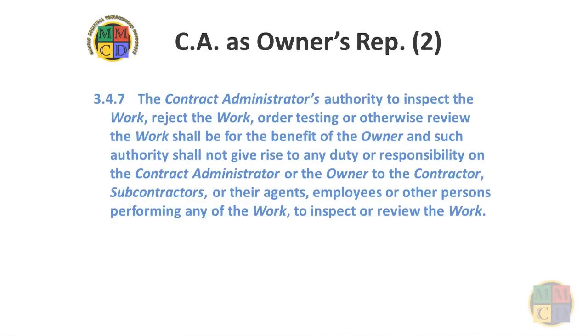Now, let's consider the role of the CA in representing the design firm. It's often the case that the owner and/or the design firm will want the CA to be from the design firm to ensure that the design concepts and assumptions are not compromised. This is perfectly okay under the MMCD and makes a lot of sense.